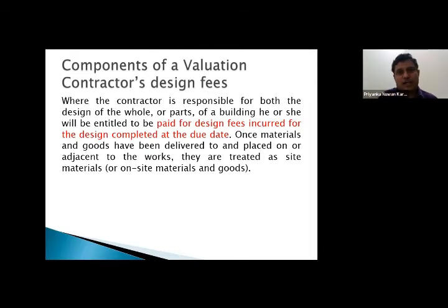you can consider the contractor, for this particular element of work, as a designer or a consulting engineer. Therefore, when you are doing the payment certificates or payment application, you have to enter into the terms and references pertaining to how you are going to pay this particular design fee. The most adopted, most acceptable version is that until the completion of the works, you keep 5%. It is similar to the retention, where you keep 5% towards the end of the project. Once the completion certificate has been issued, half of the retention will be released.